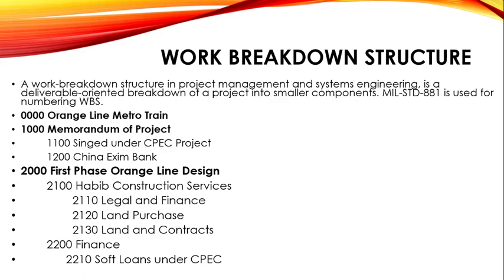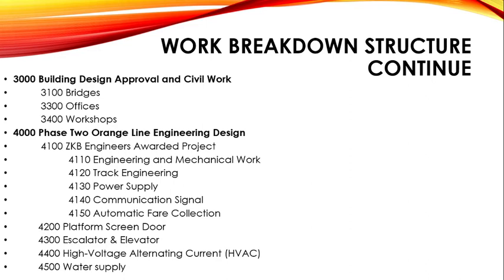First we have the memorandum of the project, signed under the CPEC, and under which there is also the CPEC Exim Bank, which powered it. The first phase of the Orange Line train was designed by Habib Construction Services. Then legal and finance came, then land purchase, land contract, financing, soft loans, and under the CPEC, building design approval and civil work, where the bridges were made,